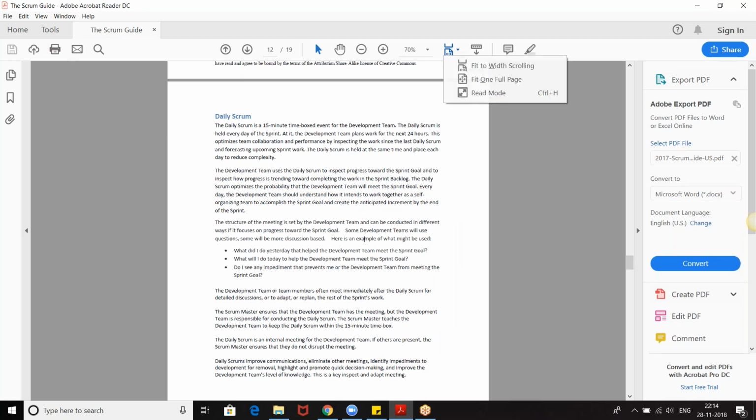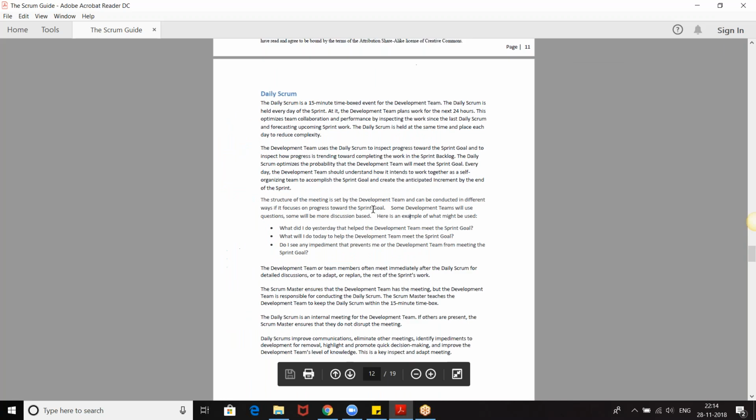It is a 15-minute time-boxed event. It is held every day of the sprint. The development team works for the next 24 hours. That's what I said, like what happened. Daily scrum usually might happen like this.